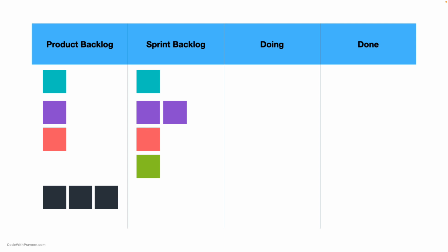During each sprint, the team picks the high priority items from this product backlog and decides to implement them in the current sprint. This selected list is called the sprint backlog. As you can guess, the sprint backlog is a subset of the product backlog. Once the backlog items are selected for the current sprint, the sprint backlog is considered locked. This means that no more items can be added to the backlog, nor can the selected items be removed from the existing backlog. This gives a clear picture for the team about the exact items that are going to be covered in the current sprint.